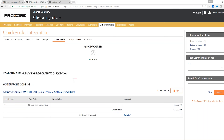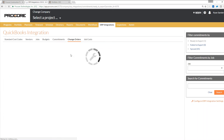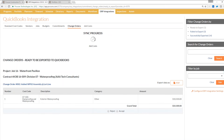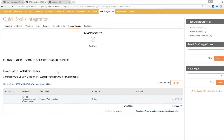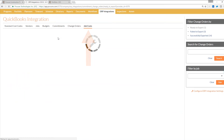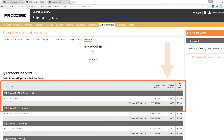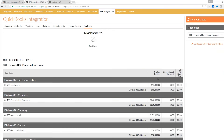Going into the change orders, it's going to be the same look and feel as the commitments tab. Only approved change orders will show up in this sub tab, and you can see these change orders are ready to be exported over to QuickBooks. I'll go ahead and send this one over. Going into my job costs sub tab, this gives me a breakdown of all my projects by filtering on the subjobs. You can see here the original budget amount, my commitment invoice, and then my job-to-date costs at a company level. I can drill down into my budget at the project level and see these job-to-date costs.